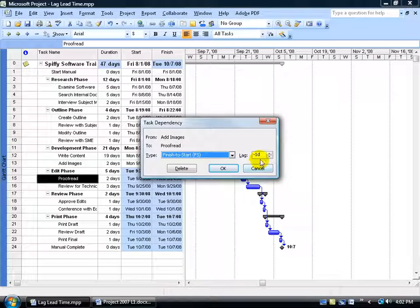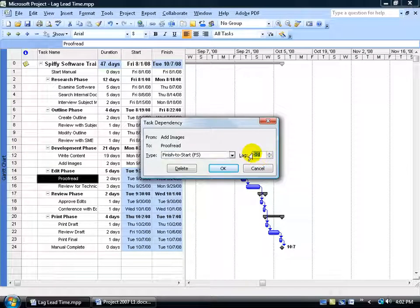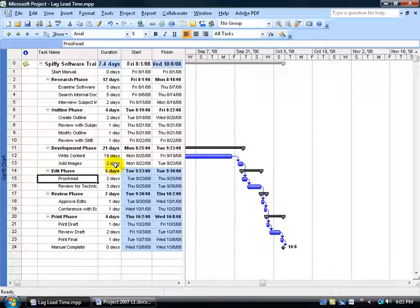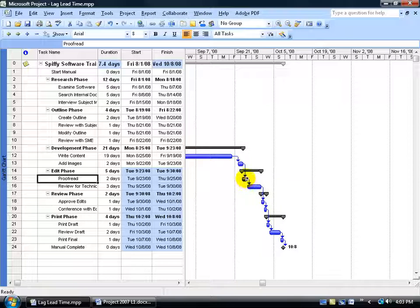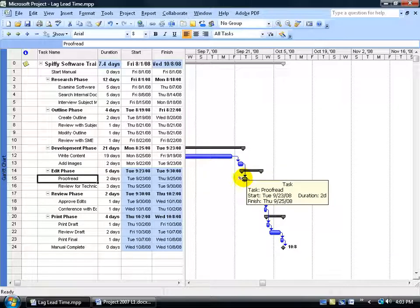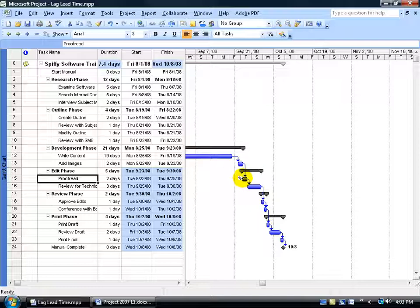I'm going to double-click on this little line here. Now I can make the change here. Instead of negative one day, how about if we do negative 30% and hit enter. What that means is that the successor would start after its predecessor has finished 70% of the task. So its predecessor has to go through 70% of two days. And remember, it's by hours there. So two days equals 16 hours. After it completes 70%, then it's going to have a lead time or start at 30%. So again, looking at here, it's starting a little bit earlier here. And I wouldn't basically go off that. But nonetheless, you get the point here that you can use percentages or you can use your hours, minutes, days, weeks, or months.